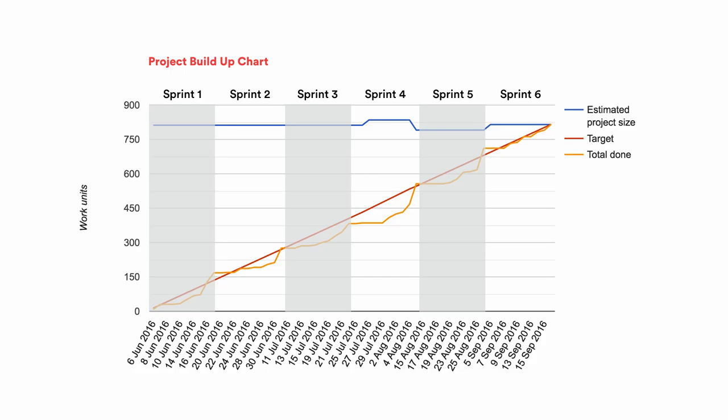So I was the product owner and an Agile coach on this project, and I kept a product owner journal where I kept track of the daily stand-ups, what was committed to each sprint, what was done each day, what the sticking points were, and what the resolution was. This was really important to be able to go back to from time to time, but it also gave me a reason to keep track of stuff that would lead to something useful like this cool build-up